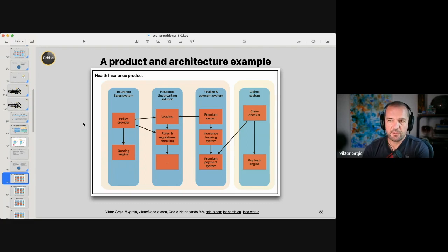What's important in a feature team adoption map is to avoid having too many granularities. There is a correlation between the number of people involved and the number of granularities that you want to have. So if you have something like, I don't know, 100 or 150 people involved, then more than 3 is too much, okay?